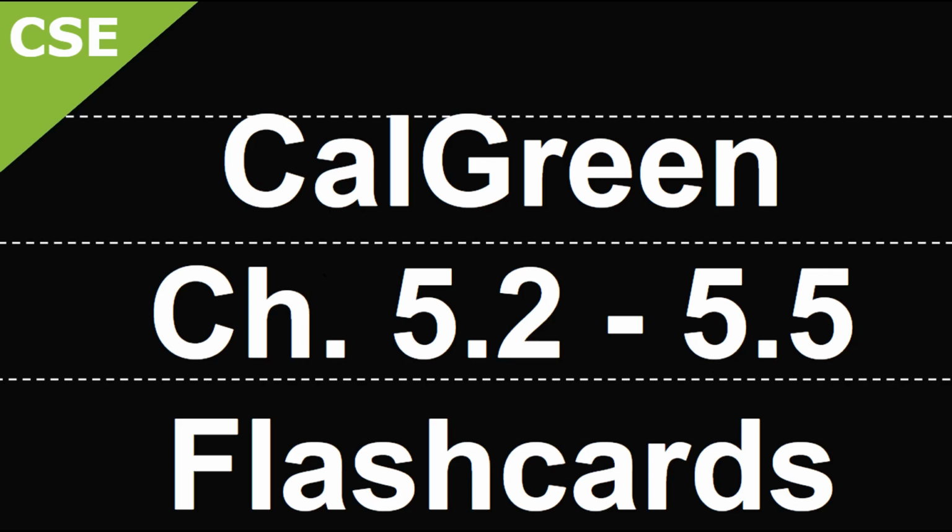Let's now discuss further each of those items in that list of 7 for commissioning, starting with the Owner's Project Requirements, OPR. The OPR should be done before design phase begins. It must document the environmental and sustainability goals, the building sustainability goals, indoor environmental quality requirements, project program including hours of operation, equipment and system expectations, and building occupant and operations and maintenance personnel expectations.